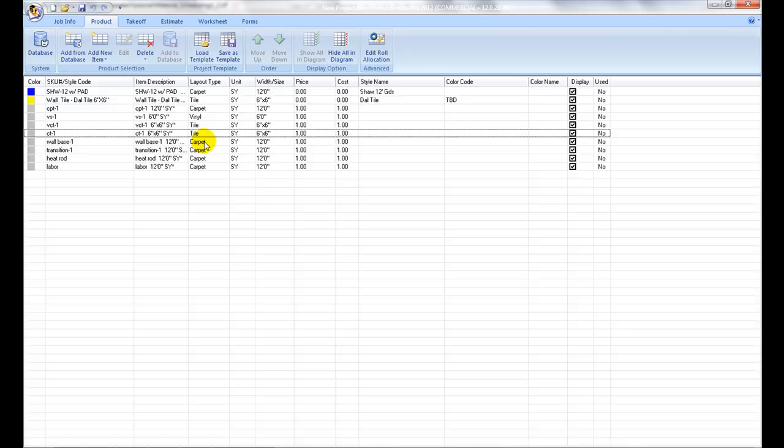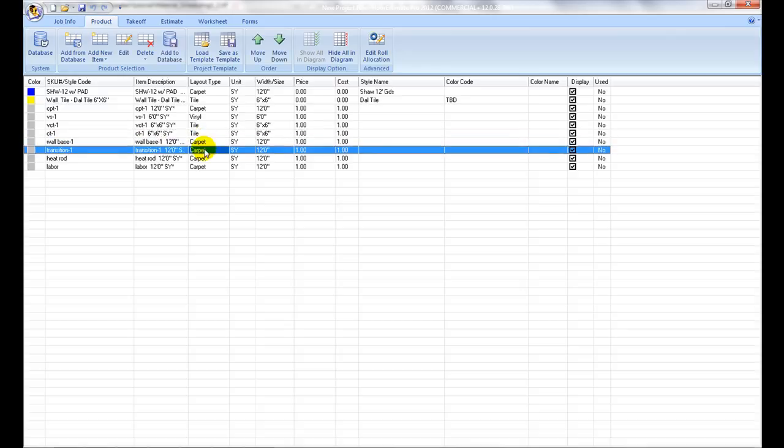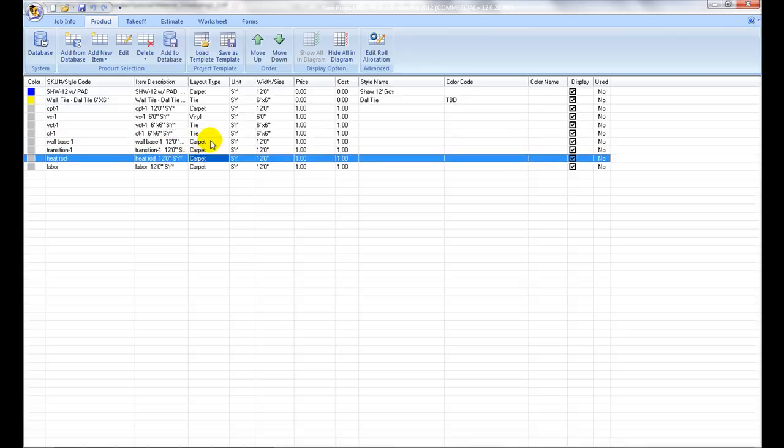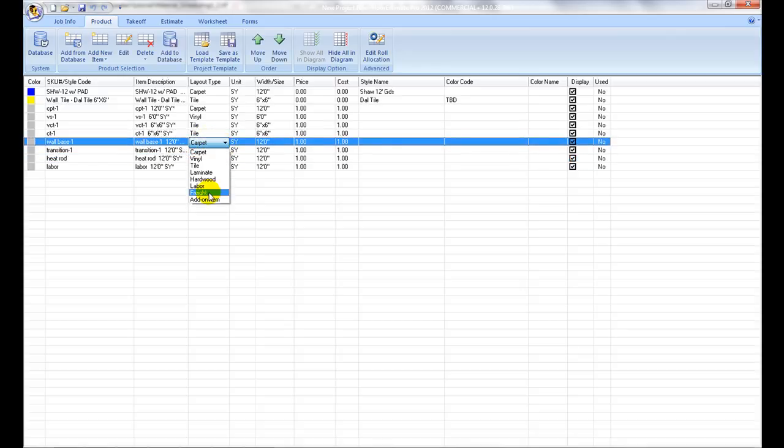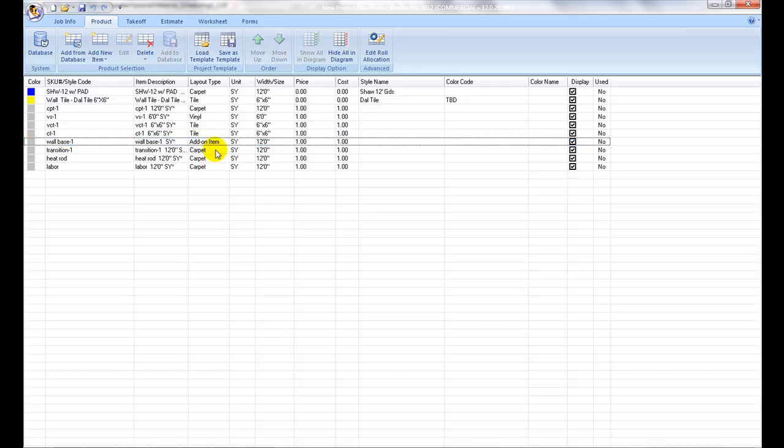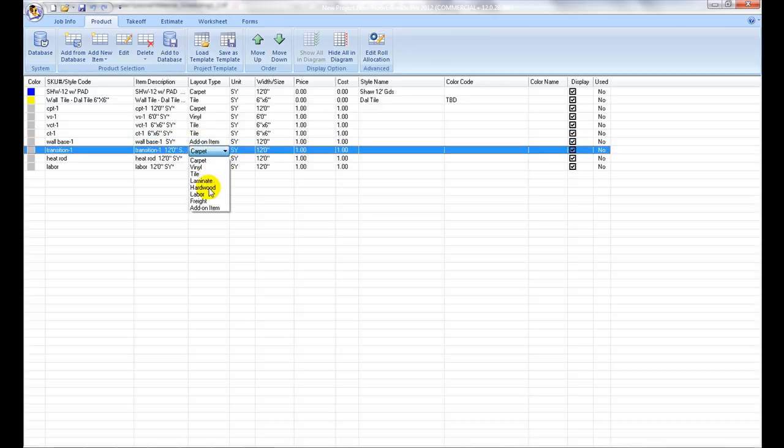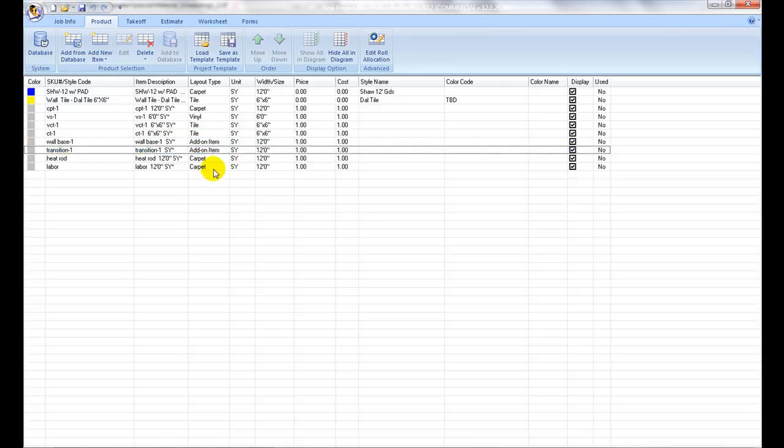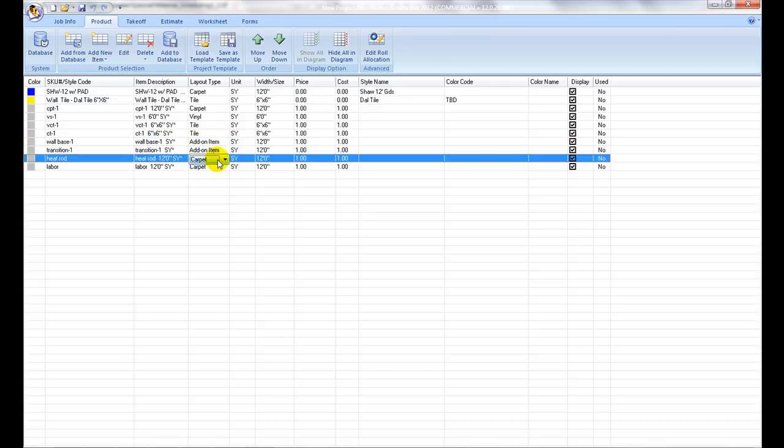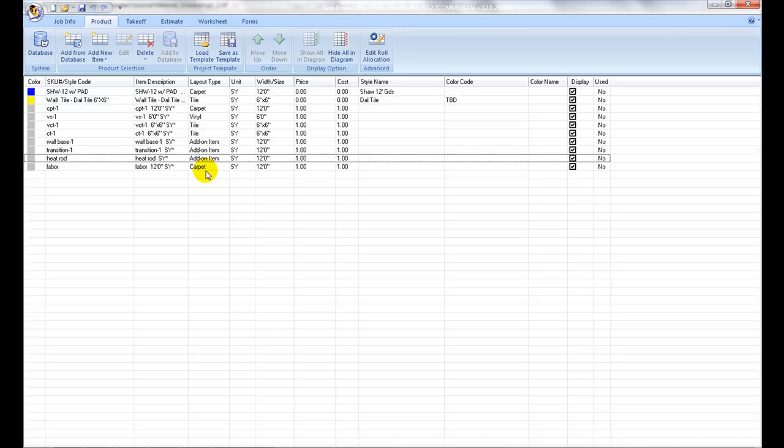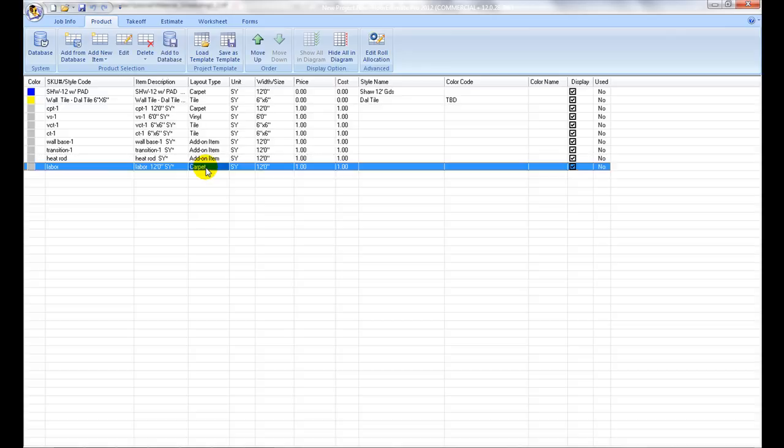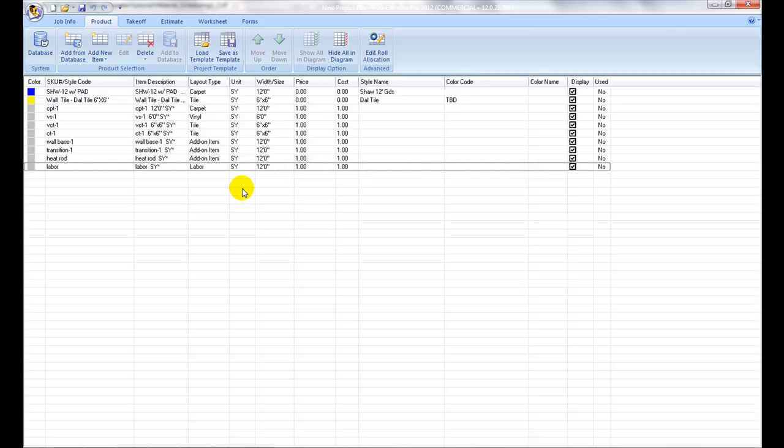For installation add items such as base, underlayment, heat welding rod, select add-on as its layout type. If it is labor or freight, select labor or freight. This will ensure that all items are categorized properly in the worksheet at a later stage.